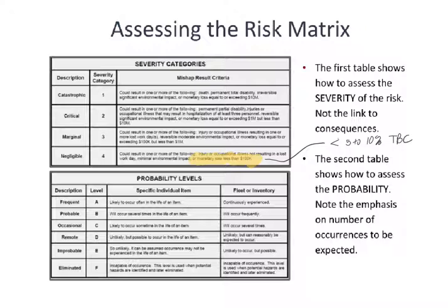If it's less than 5 to 10%, then it is not huge, okay? This one up here is approaching the full TBC or more, so perhaps greater than the TBC of the entire project. Okay, that's a significant risk financially. You'll have to be a little bit open to what that means in your project. Okay, let's keep going here.